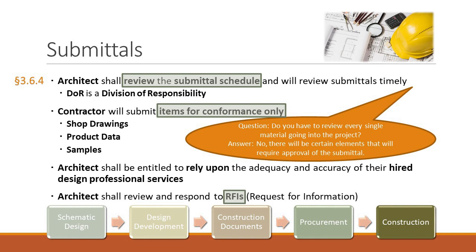If there's a fire protection system, the architect will not design the fire protection system. They're going to say it's a wet system or a dry system and it needs to meet code, and they're going to make sure there's room in their drawings for the pipes to run, but they are not going to design it.